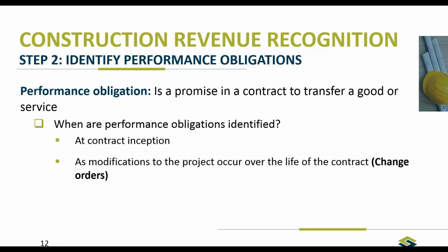they should be combined in the base contract. Now, most of the contractors that I'm working with say: if you have change orders for things you missed initially when you negotiated the contract, and as you continued on the project you identify things that have changed in scope, but not necessarily a different performance obligation. Under those circumstances, I believe it would be a part of the base contract, and that would be the same performance obligation. You wouldn't have two distinct performance obligations.